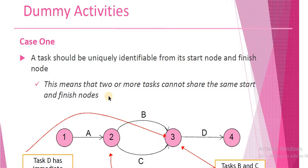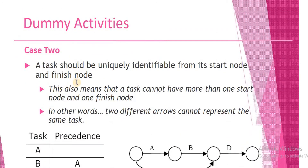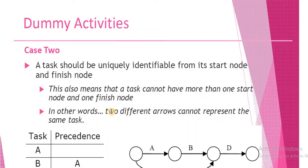In Case 2, the same fact has an additional meaning. It also means that a task cannot have more than one start node and one finish node. In other words, two different arrows cannot represent the same task.